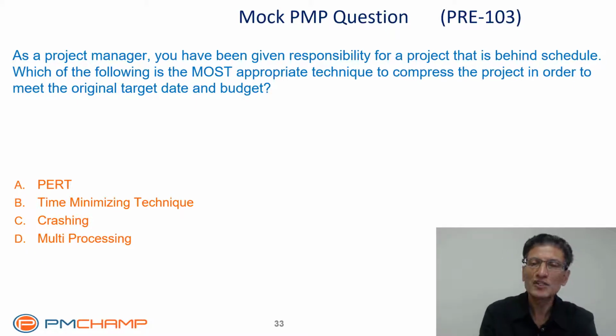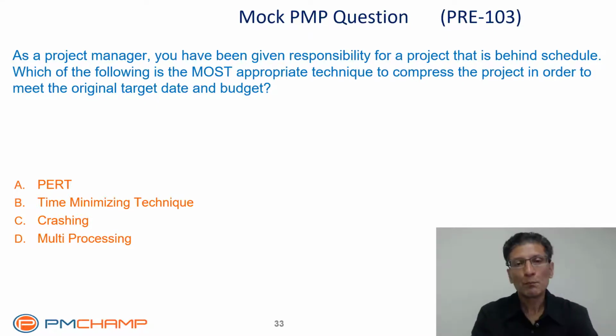Crashing, does it sound bogus to you as well? What about multiprocessing? Well, PMI talks about multitasking, but not multiprocessing. Multiprocessing are the processors in the computers. So multiprocessing, even though it looks genuine, it's a bogus term. And you may be amazed that crashing, which you might have never heard of, is one of the 2 schedule compression techniques. Therefore, it is the right answer. So here only PERT and crashing were the genuine terms, and crashing happened to be the correct answer.